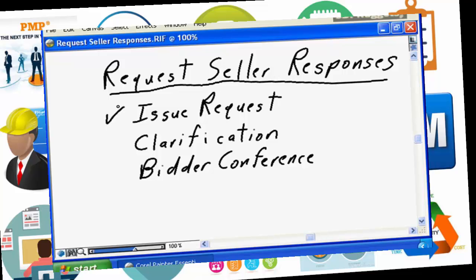Maybe your company has purchased the same type of product or service in the past and has a pre-qualified list of vendors who provide the product or service, in which case issuing the request is as simple as contacting that pre-qualified list of vendors and saying, "Here is my current request, please respond with how you will satisfy this." Perhaps you need to advertise a little broader than that.